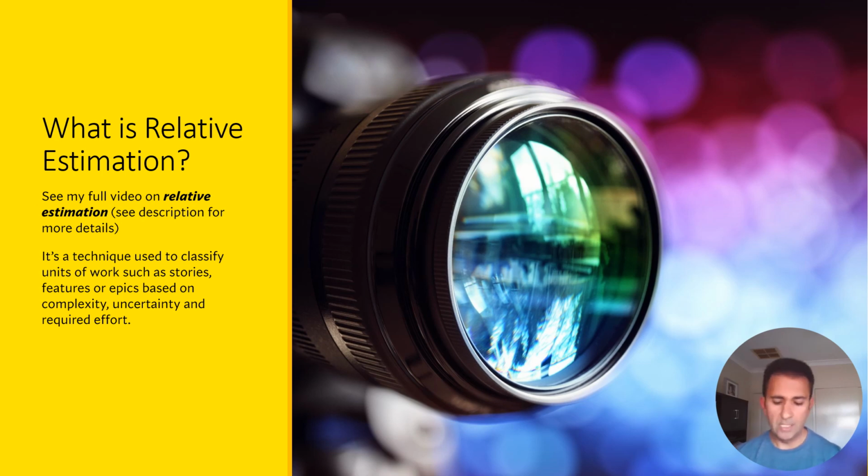As the name implies, you are estimating a story by comparing it to a benchmark. And the benchmark typically is a simpler story where you are fairly confident about the content of the story and how you want to approach it. You take that story as a benchmark and you go, all right, if, for example, that story is a one-point story or a three-point story, let me compare the story that I'm estimating with that one and figure out whether it's bigger in size or smaller in size.